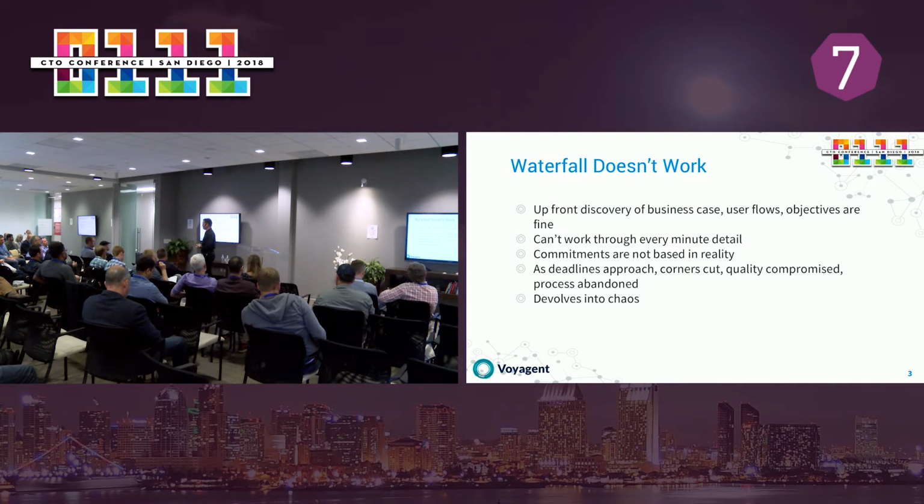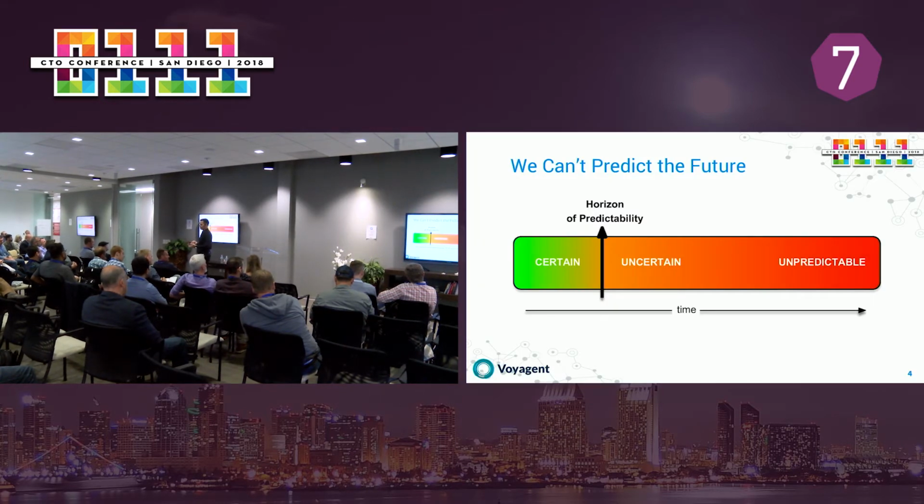And so what ends up happening is that leadership sets this goal, they set this deadline, and then you go off and you try to work on something for a while, and then when the deadline approaches, you say, actually, we don't have that. Everyone gets all flustered, and you start cutting corners. You compromise your quality, you squeeze QA, you abandon your process, and everything devolves into chaos, right? So we said, well, okay, we're really bad at predicting the future, so let's just not do that and just start doing things in 2-week cycles, right? We're really good at predicting at least 2 weeks ahead of time, right? Maybe. Okay, so let's do Agile then.